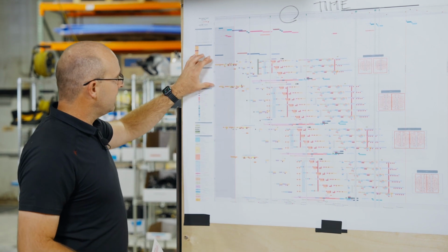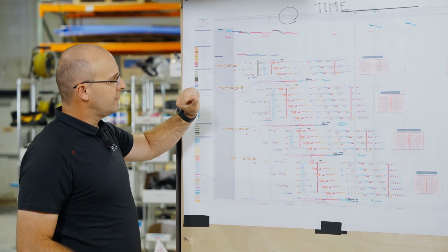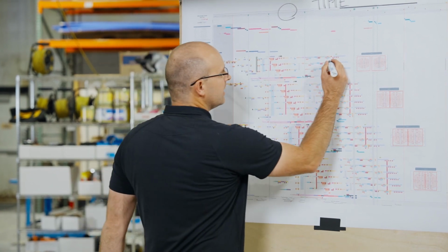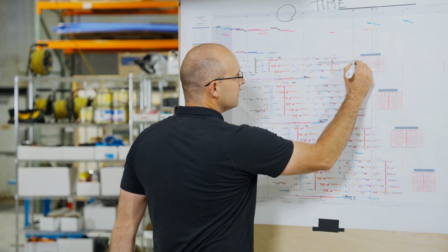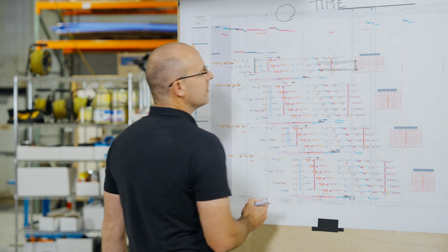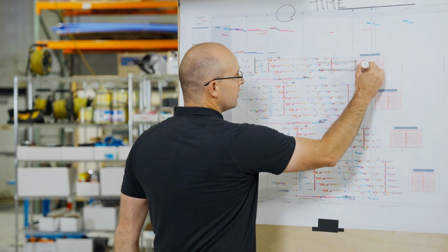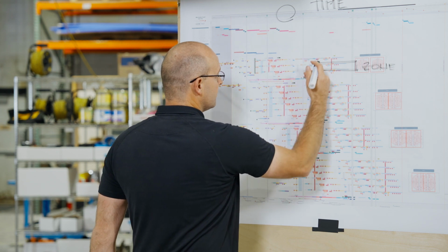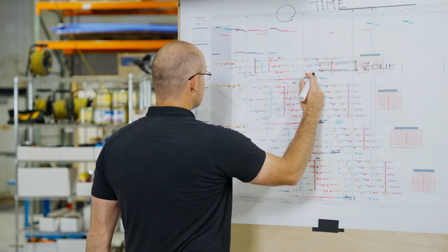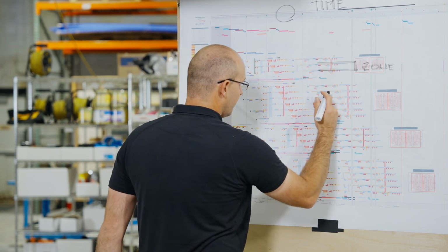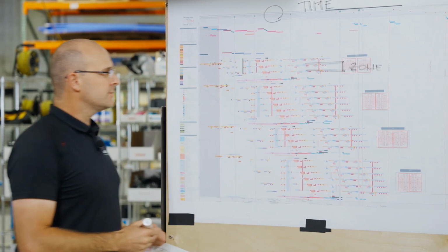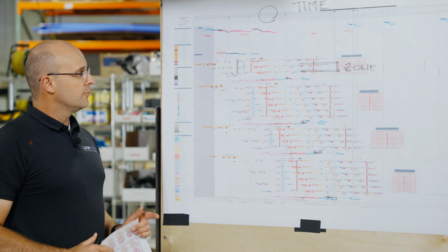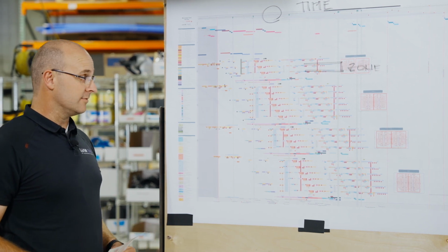You'll see that the phases and zones have a few more rows, meaning that from that line to this line is the actual zone designation, and that repeats 1, 2, 3. And then it continues in this second area, 1, 2, 3, 4, 5, 6. The difference between the macro and the norm is that the norm level brings it down to the day-by-day level.